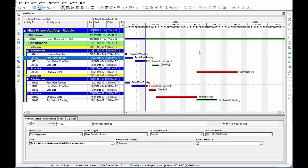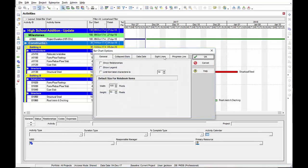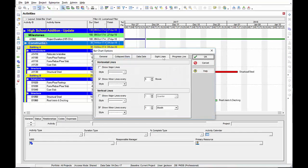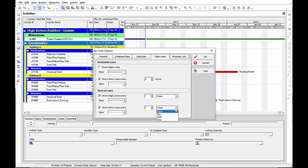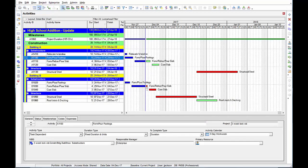There is my timeframe that I want to show. Now one more thing that I like to do is to get some good grid lines to make it easier to read. Usually in a look ahead schedule, project schedulers and field people like to see what day of the week activities are starting. I can show that by right clicking, set bar chart options, site lines, and I want a major site line. I turn that on. Save that to a week and my minor site lines to a day. Click OK. Now it's easy for me to see. This activity is finishing on Monday. These are going through up through Thursday and this activity is working through Friday.